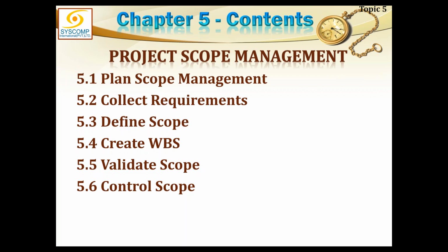You see, with every step, this scope keeps getting elaborated, and ultimately, this is the time when it is done by the project manager, who is the person who is going to be doing this project with his team. He is the person who is putting the final touches to the scope, and when he establishes this detailed scope, he will get it approved by the bosses, and only then he can do further planning and ultimately the implementation of the project. So without scope, you can't move a single step ahead. You have to have a definite scope on which you base your further plan and your execution. Therefore, the major output from here is the scope statement. We'll talk about it more.